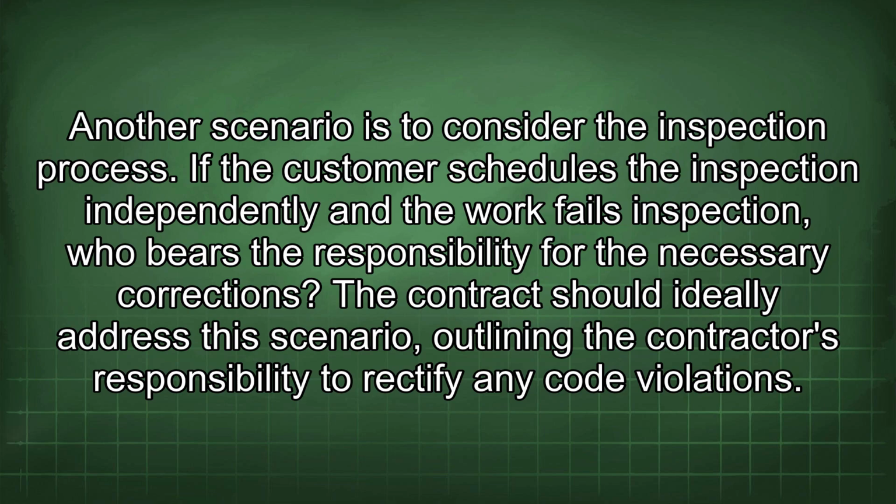Another scenario is to consider the inspection process. If the customer schedules the inspection independently and the work fails inspection, who bears the responsibility for the necessary corrections? The contract should ideally address the scenario, outlining the contractor's responsibility to rectify any code violations.